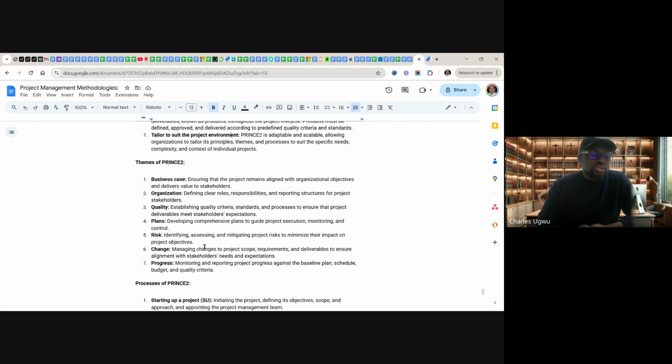That is what PRINCE2 is telling you. And then we have progress. Monitor and report project progress against the baseline. We know what baseline means: versioning of our project plan, schedule, budget, and quality criteria. You must have a baseline, and monitor as you progress.